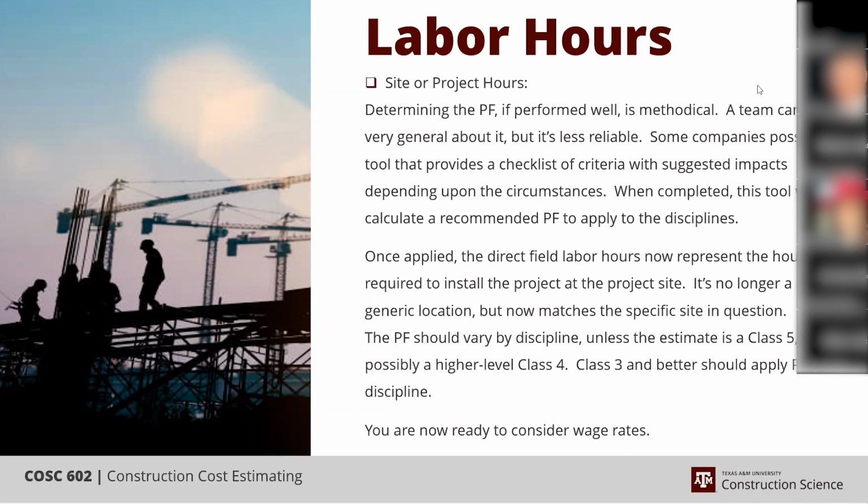I might have missed it. Those labor hours you're talking about, are these similar? When I used to do estimating 20-plus years ago, we had these labor hours. When we say 0.5 labor hours, it's not really 30 minutes for one person. It's combined labor hours for a crew of people for a specific discipline. That's correct. Exactly.